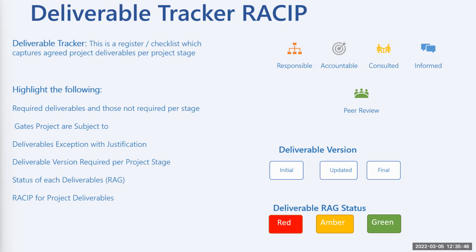And one thing I wanted to bring to your attention as well is that at the beginning of the project, there's a timeline that is assigned to the project. Because the projects are broken down into different stages and phases, they also have a timeline for each of the stages. So you would say for stage 1 now, we will deliver it in the next 2 months.